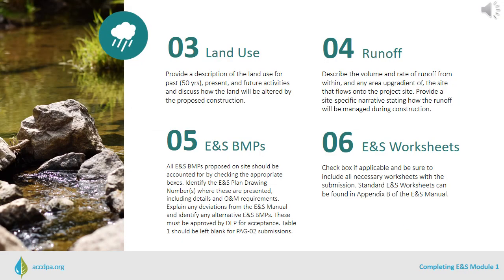Under Item 3, please provide a description of the land use for the past 50 years, present use, and future activities, and discuss how the land will be altered by the proposed construction. Item 4 discusses runoff. Use this section to describe the volume and rate of runoff, not only from within the site but also from the area up-gradient that flows onto the project. Provide a site-specific narrative stating how the runoff will be managed during the ENS phase.